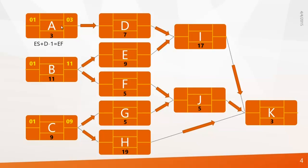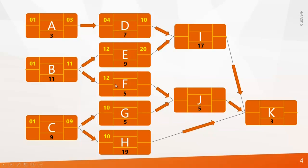Now at the next level: activity D is waiting for activity A to complete. We know A finishes at day 3, so D will start on day 4. The equation is early finish plus 1 gives early start of the next activity. Similarly, E and F start after B, which is day 12. G and H start at day 10. Now we can calculate early finish: D is 4 plus 7 minus 1 equals 10; E is 12 plus 9 minus 1 equals 20; F is 16; G is 14; and H is 28.